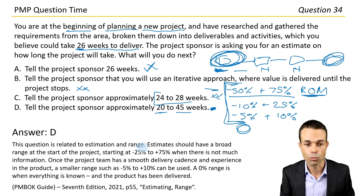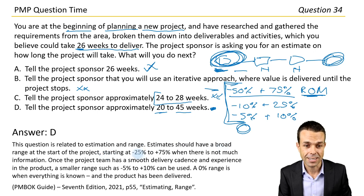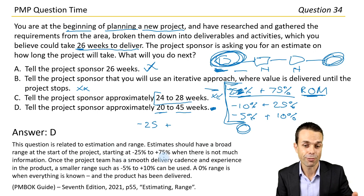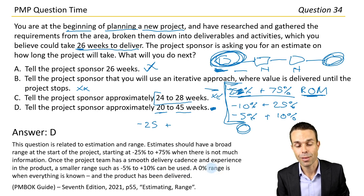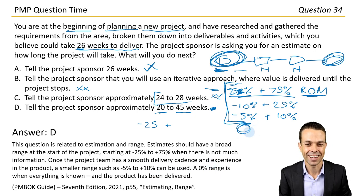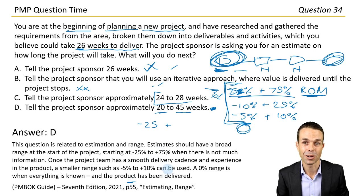This question is related to estimation and range. Estimates should have a broad range at the start of the project — starting at minus 25 to plus 75. That's good to know when there is not much information. Once the project team has a smooth delivery cadence and experience in the product, a smaller range such as minus 5 to plus 10% can be used. A 0% range is when everything is known and the product has been delivered. Page 55 under estimating and range in the PMBOK Guide 7th edition.